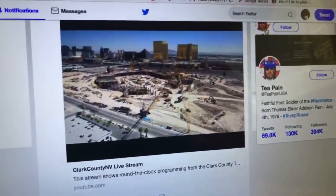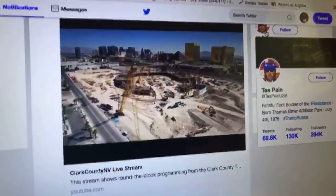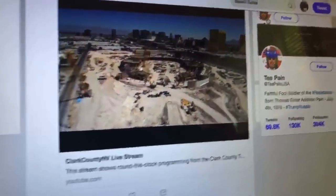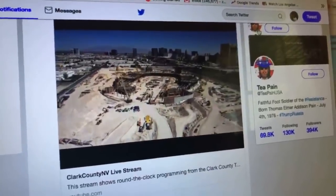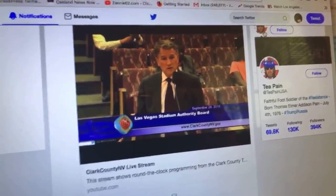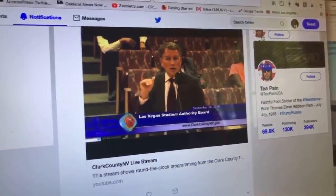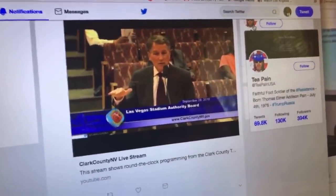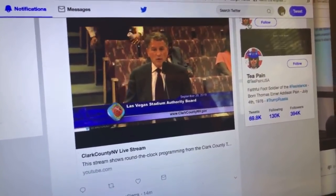You can see we still have a little bit of excavation here and there to go. It's intentionally held back so that there's truck access down into the site. As I was explaining to Mr. Taberti yesterday as we were walking around, there's actually more progress made on the field level than is readily noticeable there, because as they pour up the field wall, for instance, they then cover that with gravel so that the crane and other heavy equipment can operate over top of that. So there's actually a good deal of completed work that's now been intentionally covered by gravel, which will displace the load and eventually be removed once that heavy work overhead is completed.